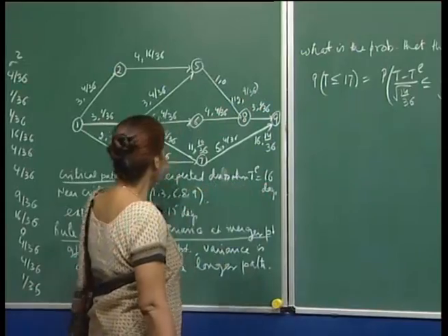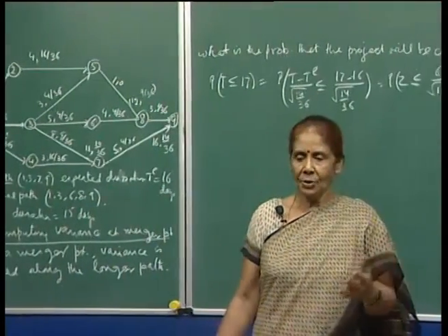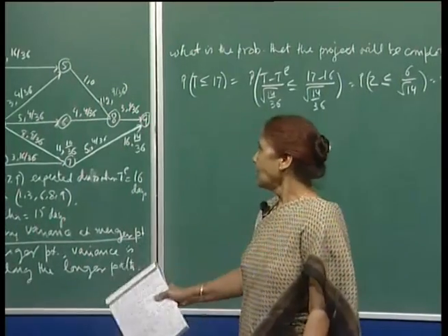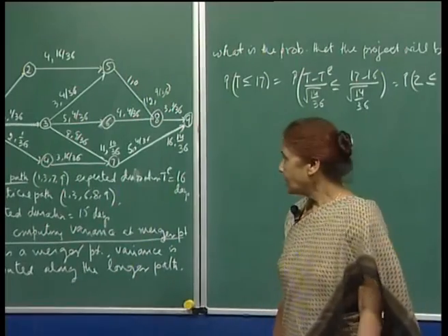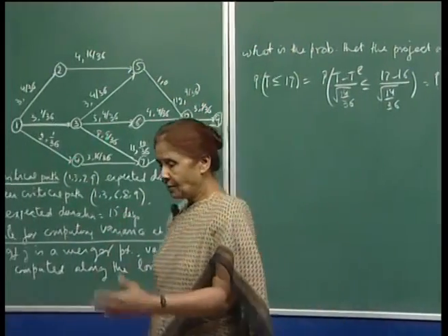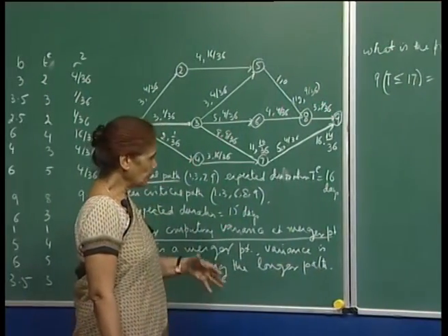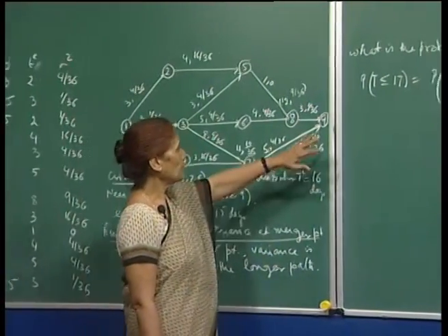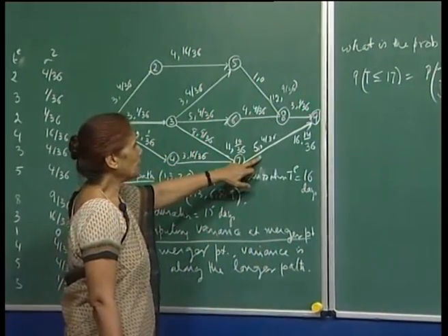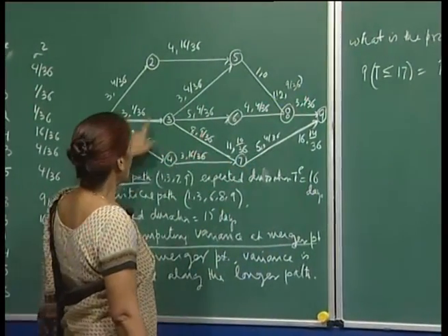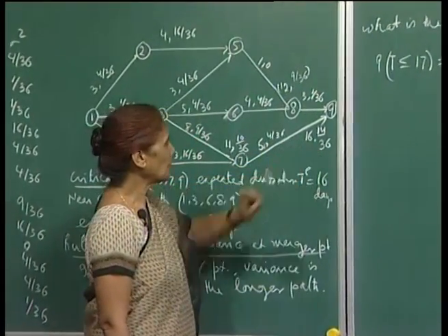This is what I am doing. This would be more realistic when you have a very large project. Here, just to show you the methods, I am taking a small example, but normally you will have a few hundred jobs, and so the independence would be more realistic in that situation. So, I just add up the variances of the activities which make up the critical path. That gives me 1 plus 9, 10, 10 plus 4, 14 upon 36.